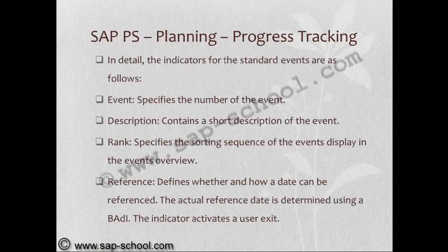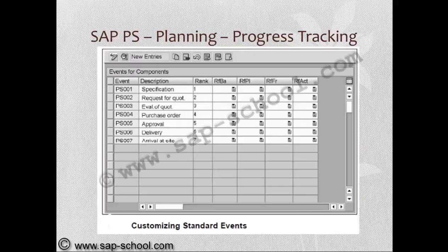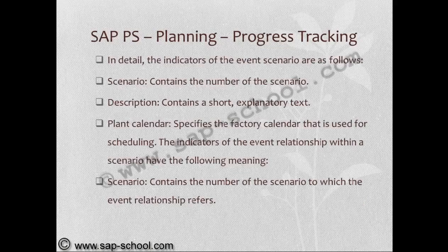For events, we set the number of events, description, a short description of the event, rank, which specifies the sorting sequence of the events, display in the events, and reference, which defines whether and how a date can be referenced. So this is the event screen of the customizing. After the events, the next screen is scenarios.